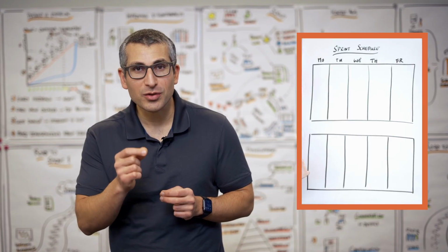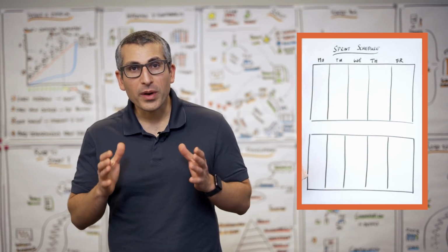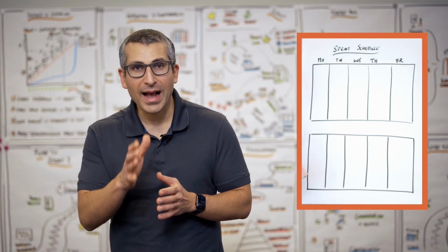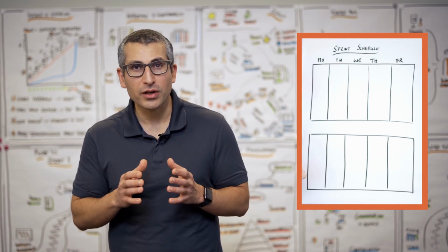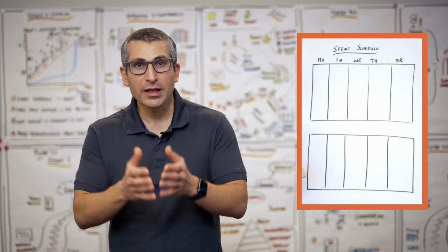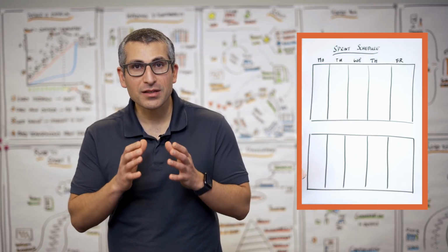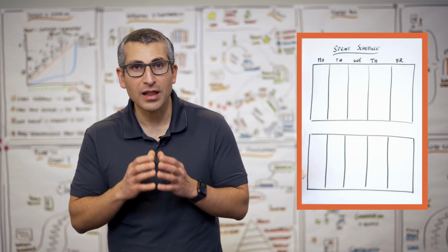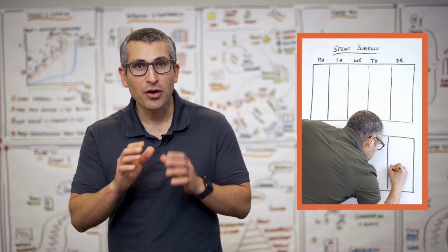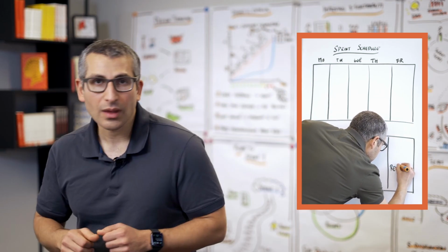Basic customer centricity. So before we go and schedule each of those events, we start out by asking our most important stakeholders at what day and what time would you be available to come to our team and give us feedback on what we have delivered in that specific sprint. That's the time for our sprint review.